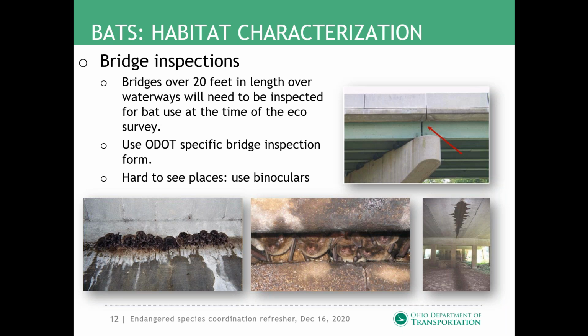And they also told us that bats roost in bridges. So bridges over 20 feet in length over waterways will have to be inspected for bat use at the time of the eco survey. The ESR isn't complete unless this is done.